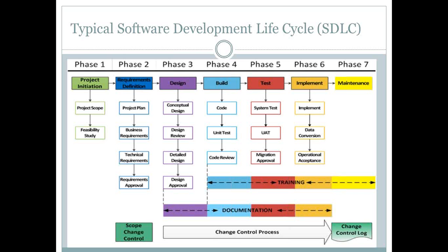All those details are the responsibility of a project manager, but he would take the inputs from the various stream leads. For the business requirements, it would be a business analyst who would be providing it, and for design and development, it would be the technical architect who would provide the details about the detailed activities, who is going to do them, and how much time it would take. All those details would be given by those respective leads. Similarly, for testing, a QA lead would give you the details about how much time it would take for testing, right? Sometimes for smaller projects, phases 3 to 5 would generally be covered by the technical architect, right?